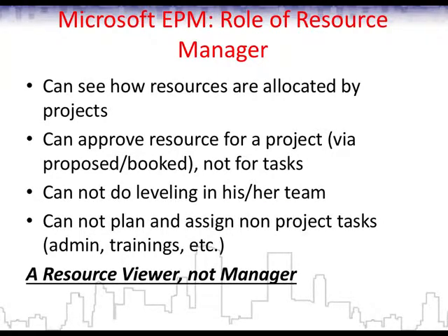And of course, he cannot plan and assign resources to non-project tasks. You can only specify these in categories or time categories, and a resource manager can only approve or reject actuals, but he cannot do any planning in this area. So I would say that the resource manager in Project Server, in its typical out-of-the-box installation with typical permissions, is more of a resource viewer, but not actually a manager. I hope you agree with me. I would like to see your comments in the chat.